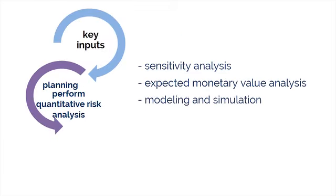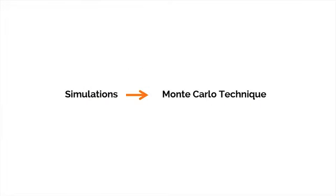A third technique is modeling and simulation. We can simulate a project in a model and translate the specified detailed uncertainties of the project into their potential impact on project objectives. We typically perform simulations using the Monte Carlo technique. In a simulation, we compute the project model many times with input values chosen at random for each iteration from the probability distributions of these variables. It's really about conducting what-if scenarios on those risks that may pose the greatest threat or present the greatest opportunity on the project, and seeing how any change to a project parameter will impact the project in terms of cost or schedule.